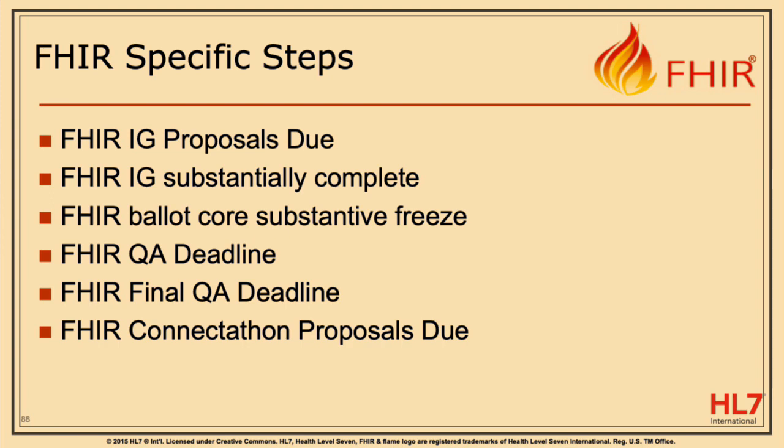Don't know if I saw enough. Actually, you can just explain the lead time for PSS, because I think that gets a lot of people. Yeah, I didn't go into those specific processes. I did have some dates in here and we took them out. So a project scope statement has to be approved for the ballot cycle. I'm going to get this wrong, I think it's 4 weeks before the work group prior to the ballot cycle. If I got it right.